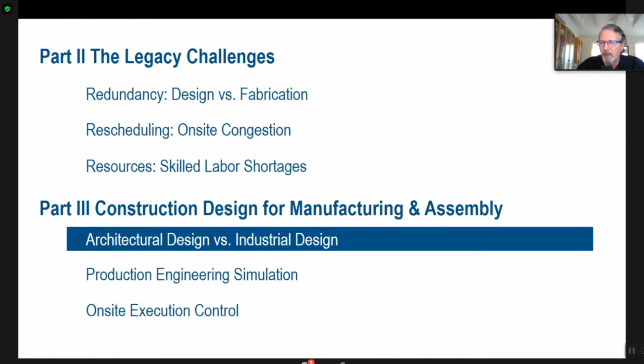By pre-committing to certain manufacturers, whether it's a facade system or an elevator, you're going to get a 20-25% discount by early commitment. That reduces the manufacturer's cost for marketing, for competing, and it creates predictability for manufacturing for them. So I think it's logistics for construction people, and I think it's moving in intellectual property for architects and engineers. Does that answer your question, Pete?